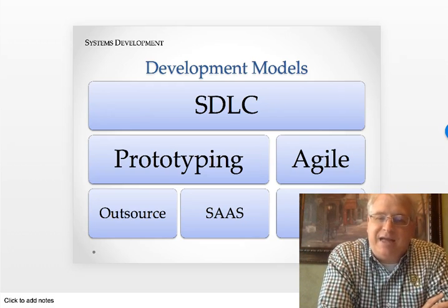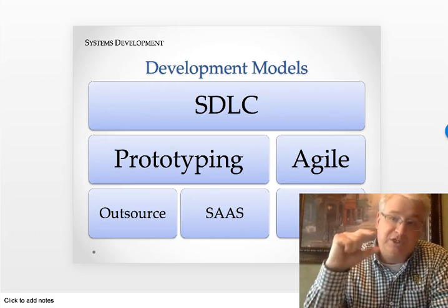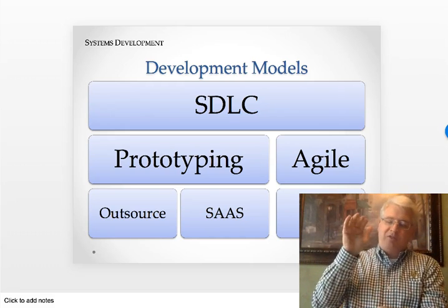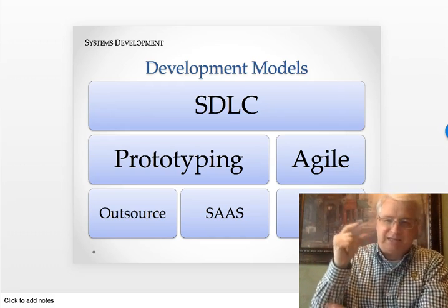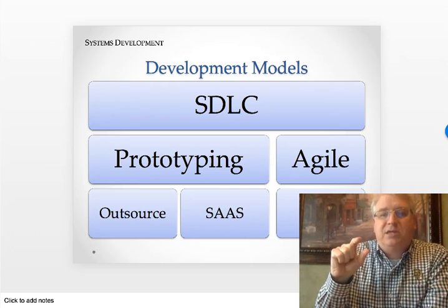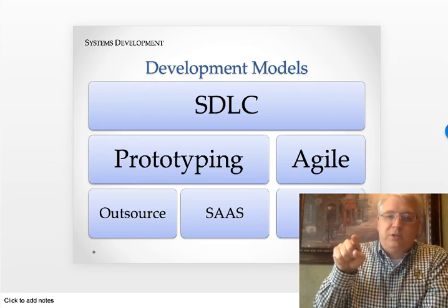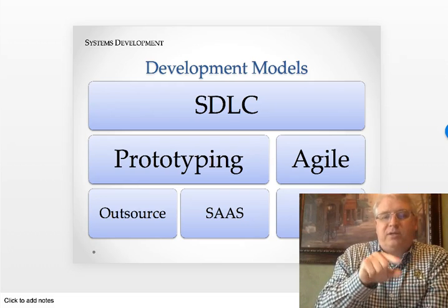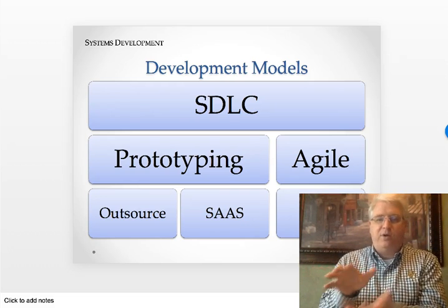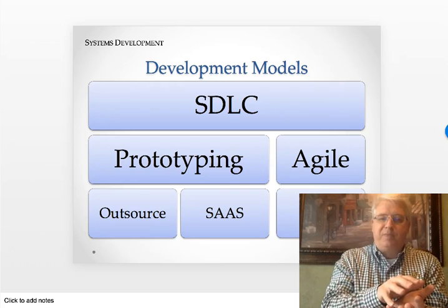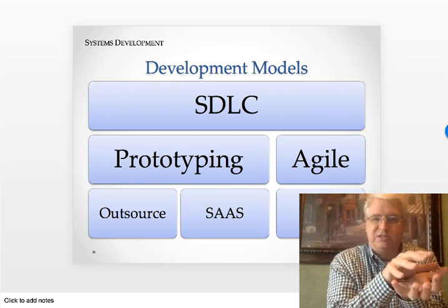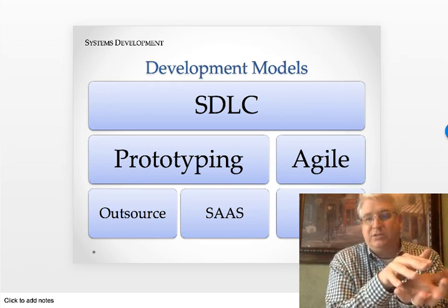But the idea behind Agile is that you work in much, much smaller groupings. So you don't have to know all the tasks. You just have to know the first 3 tasks, or the first small number of tasks. And you go and work on those. And you bring them back to the customer and say, here's what you asked for, here's what we developed, the first little bit. Is this what you wanted?